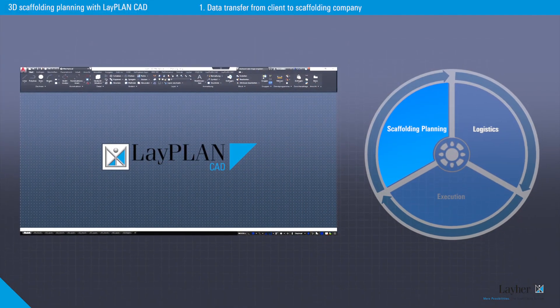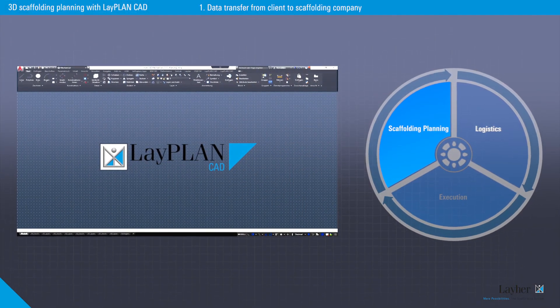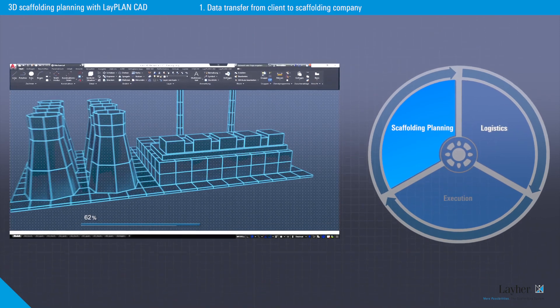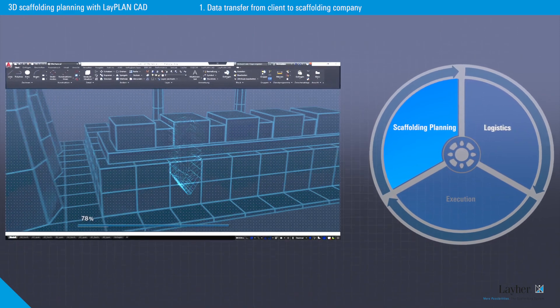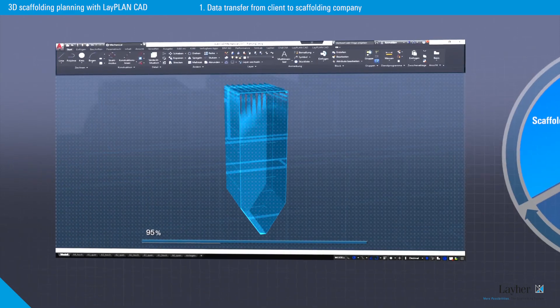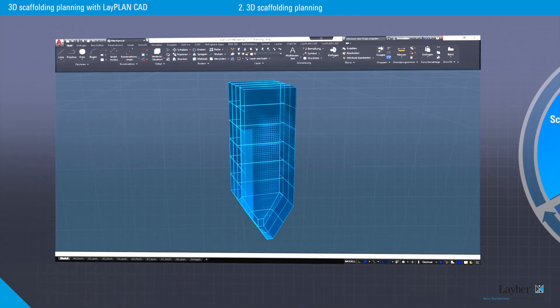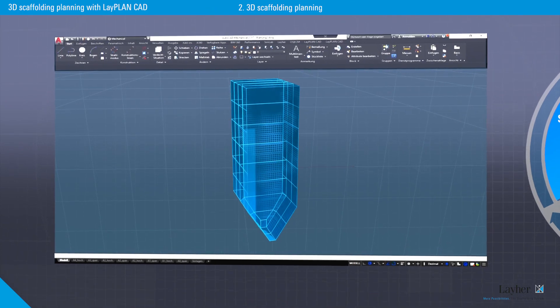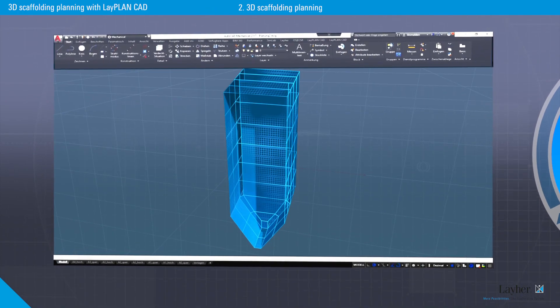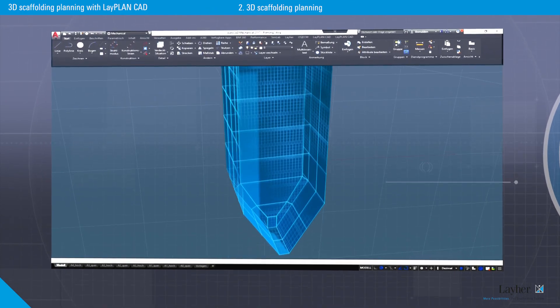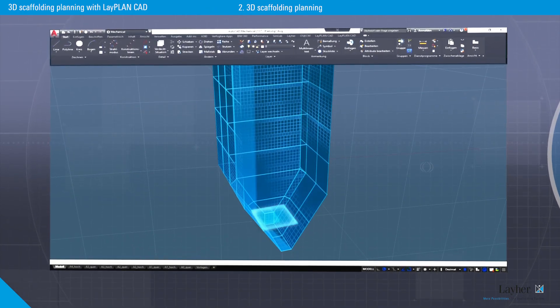The digital model of the structure, which is to receive scaffolding, acts as the basis for planning and is imported into LiPlan CAD. This is followed by scaffolding planning in a three-dimensional space.